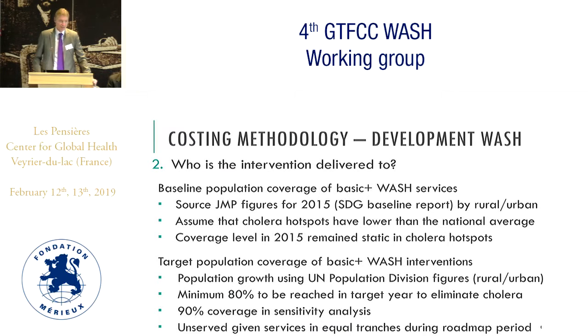And in order to know at what time point populations are served, we just assumed that of the total population in hotspots that needs to be served until the end of the roadmap period for a country, equal tranches of population would be served until the end of the roadmap period.